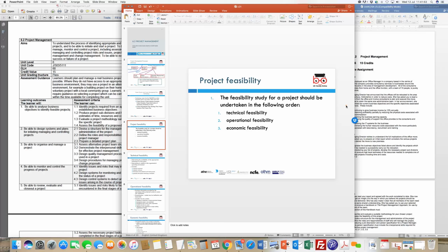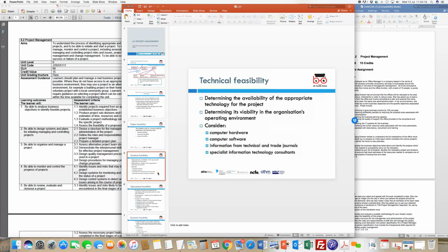The viability in terms of costs, operations, people, manpower, and all those things have to be known before you even start the project. You don't want to be in a position as a developer where you run out of cash to be able to employ people and complete those houses before the whole plan is done. So that is all done under the context of something called project feasibility.